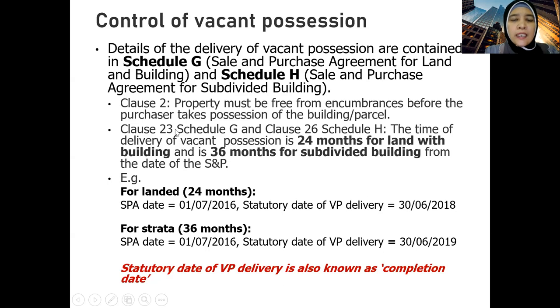Then clause 23 of Schedule G and clause 26 of Schedule H, what is it? It's the timing, the time of delivery of vacant possession. For landed properties, for land with building, it's 24 months.